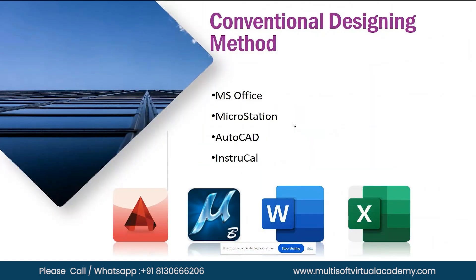We all know what EPC is. EPC companies: E stands for Engineering, P stands for Procurement, C stands for Construction and Commissioning. If you take any kind of project — refinery projects, power plant projects — EPC stages will be involved. Engineering needs to be completed first, then procurement starts, and once procurement is complete, construction and commissioning will start.